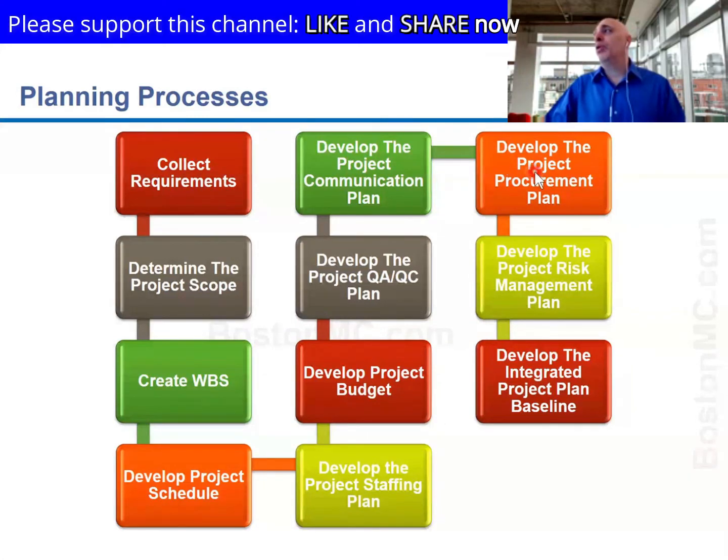We also need to figure our procurement plan, which is how we are going to do the outsourcing or the tendering for the move, or search for a vendor or contractor. The procurement plan may actually happen here. When we are trying to break down the work into smaller pieces, we could say, for example, the move itself will be handled by a contractor, and that's when procurement may start the tendering process.